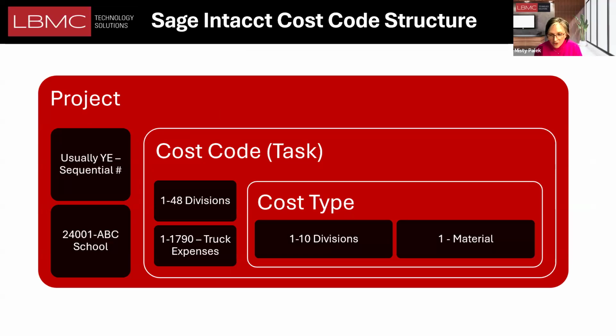So think of a project as just the shell that contains the work breakdown structure for job cost reporting. And all three of these little charts I've shown you today really are the same thing, just looking at it in a different way. So the cost code usually aligns with two areas: the project budget. So you have budgeted cost based on cost code. And that might be broken down by divisions. And then underneath those divisions, you have a bunch of cost codes.